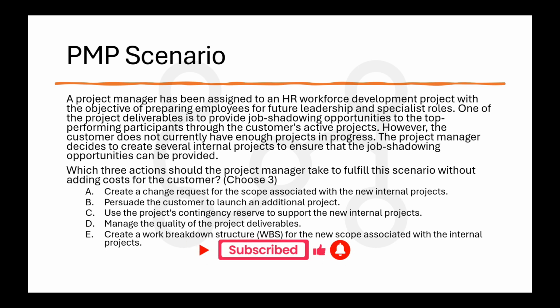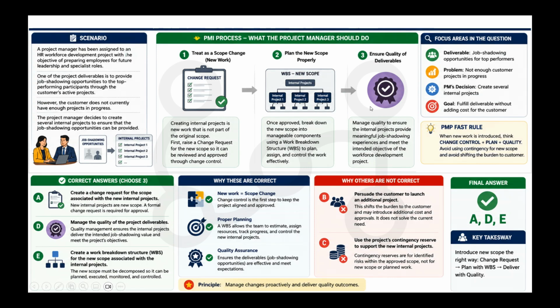Let's discuss the whole scenario in detail. So we have the complete scenario. What is the process? What does PMI say? According to PMI, we can treat this change as a scope change, because creating internal projects is new work that is not part of the original scope, right?